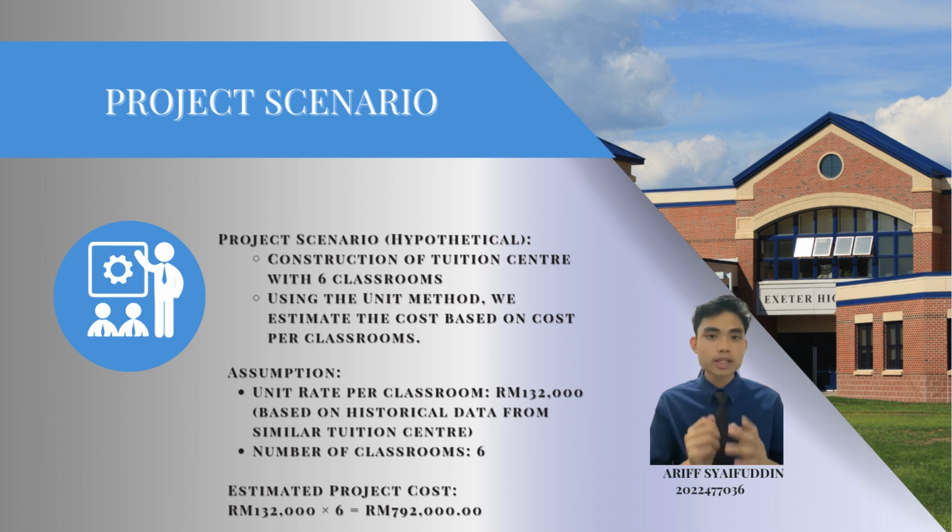So RM132,000 times 6, and the total is 792,000. That is the total estimated project cost for the tuition center.